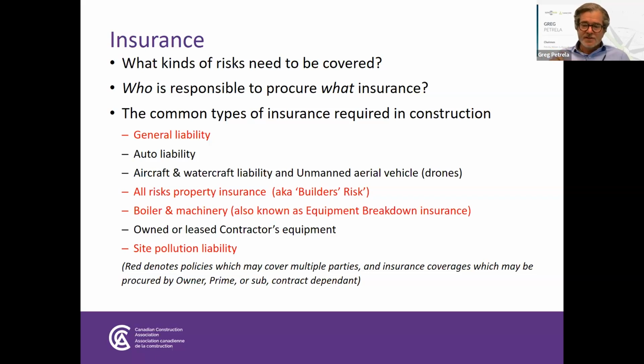Some projects say, you know what, instead of having every subtrade carry their own insurance on this project, the project is significant enough, large enough, risky enough that we're just going to want one policy, and we call that a wrap-up liability policy. You might have heard that term. We want a wrap-up policy on this project, and that will cover the prime contractor and all the subcontractors.